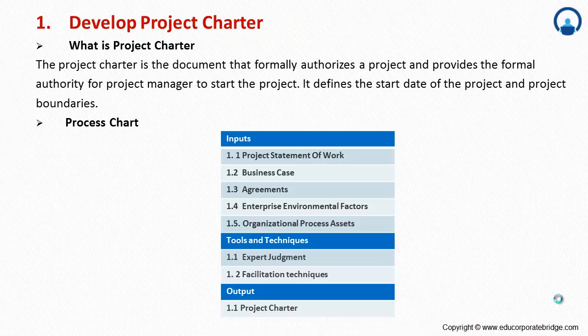However, there are some standard templates given for the project charter and are easily accessible on the internet. But the basics which go in the project charter are basically sponsor details, project manager details, what is the start date of the project, what is the objective of the project, what is the high level scope of the project, whether there are any risks, and it's finally an authority to start the project on a given date. So this is about the project charter.